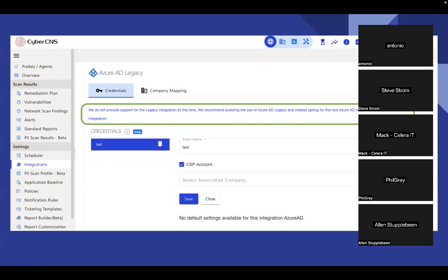So what we're going to do is that over the course of the next 90 days, as you have access to both the systems, we are not going to add more features into this system. In fact, this week will be the last week where I will talk about any enhancements that we're doing in the existing system. And all of the new features and everything will be moved over to the V4 system.